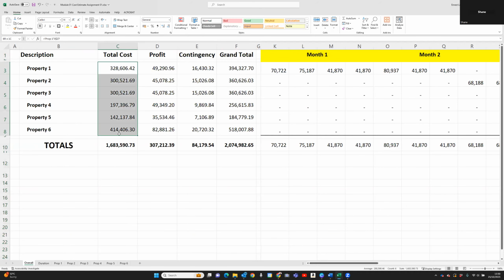So this is what it's going to cost me, 1.6 million. And I'm going to charge it at 2.4 million. So if I'm lucky, over the 8 months, I'm going to make 400,000. So that's over 8 months. What is that? That's 50,000 a month. Okay, if it all goes well, right?